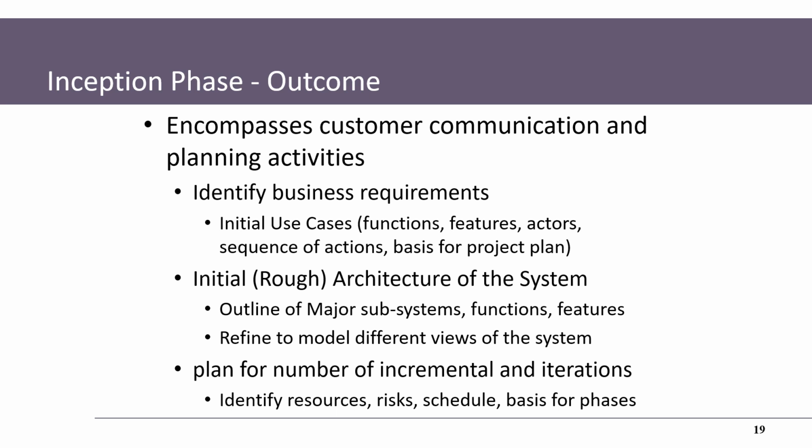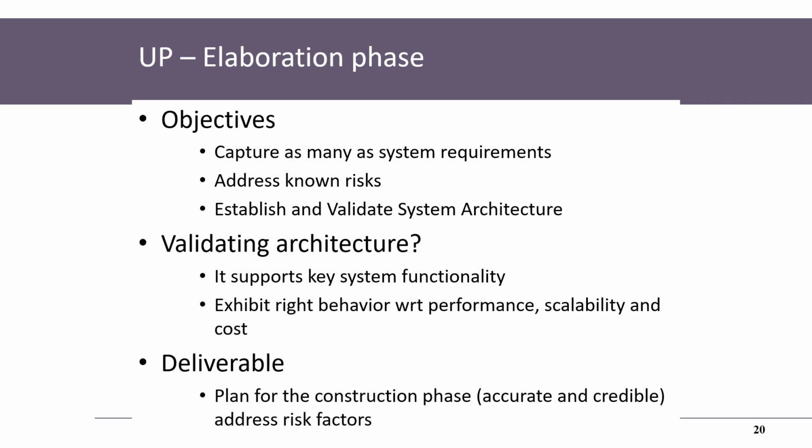Initial rough architecture of the system, an outline of the major subsystems, functions, and features. Refine to model different views of the system. Plan for a number of increments and iterations. Depending on the scope, they may come up with an overall estimate, and other things as well.